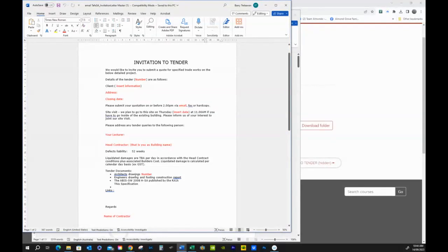Because if you don't, you may actually do what one bright spark did. And the reason I'm including this in the course is he actually agreed to and signed a tender where he was physically responsible for all maintenance for 10 years. Now, you would think no one would be stupid enough to actually do that, but that's what he did. And so then he had to spend money to go to a lawyer. The lawyer took one look and said, well, this contract's null and void anyhow, because it's illegal to actually expect that. And so it was so poorly written that the judge threw it out.